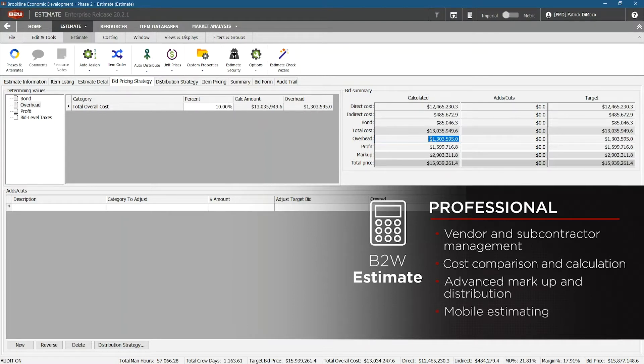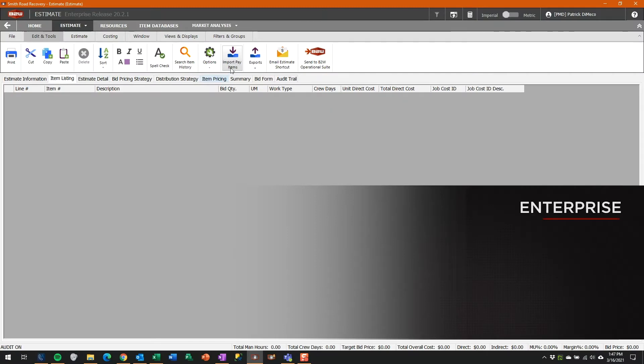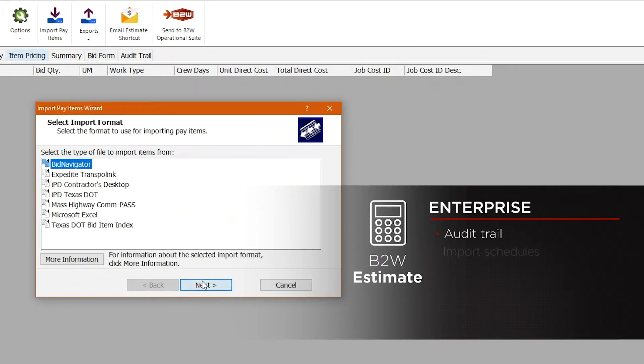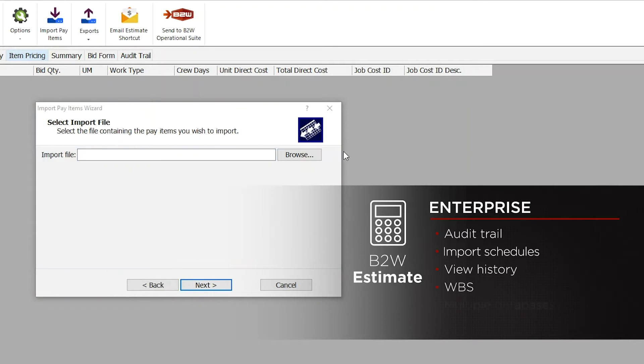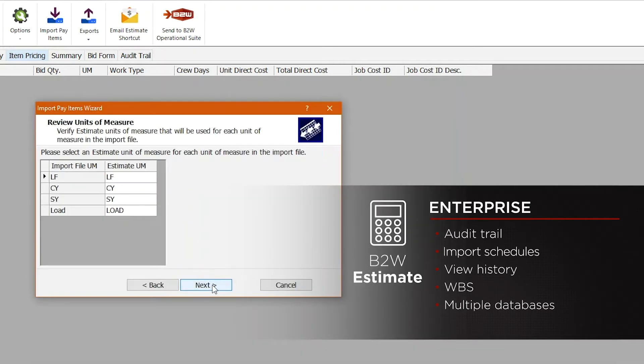This edition also adds support for mobile estimating. The Enterprise Edition of Estimate adds features such as the audit trail, which lets you know who made changes to your bid and what impact those changes had on the cost and price. You can also import bid schedules, view the history of how items have been bid in earlier estimates, and build bids using the work breakdown structure, or WBS method.